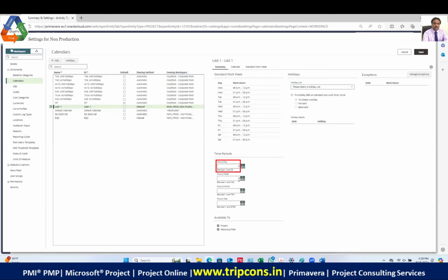Correct. Okay. Now, what is the definition of the man hours per week? Guys, you are working 6 days a week, right? So 6 multiplied by 8 is 48. So you write here 48. And since you are working 4 weeks, so 48 multiplied by 4 is how much? Check in your mobile calculator. You pull out your mobile calculator and multiply 48 by 4, it is 192. Right. So you write here 192.